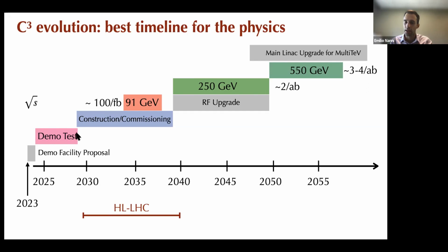And realistically, it seems like that would take on the order of 5 years because some construction would be involved, and some significant amount of procurement. Plus, in parallel with that, you'd be putting together the full proposal for the 250 GeV center of mass accelerator complex. So there's roughly that 5-year chunk of time, which is one of the fixed variables.